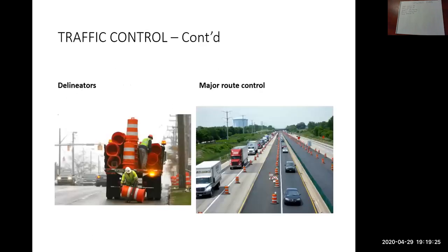So here's a photo. This truck is possibly picking up or offloading all these traffic drums, to be used in the future. You can see them lined up here on the side of the road. These are expensive. They're $100 a barrel. You can rent them, but again, if you need 200 of them, there's a cost there for sure.